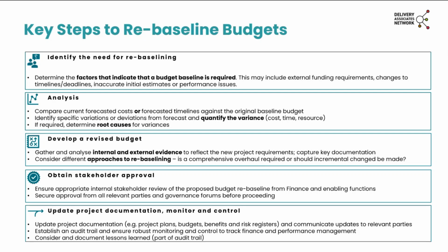Once the budget has been rebaselined, please do ensure that you update your project documentation. So that might include your project plans, your budgets, your benefit tracking documentation and risk registers as well. Further, you'll want to make sure that you're communicating updates to all relevant parties so everyone is aware that the budget rebaseline has taken place and can understand what budget you are now working to, including the time horizon.